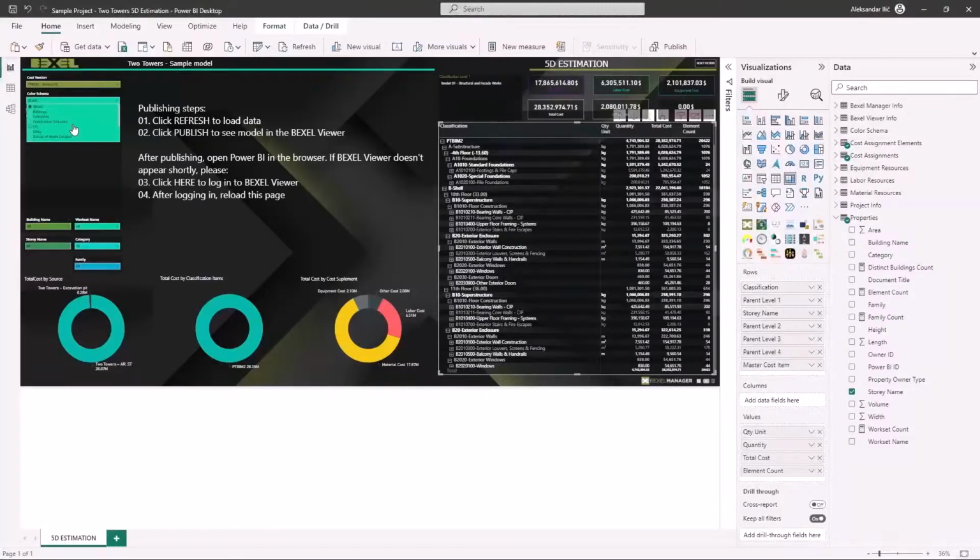They simply decided which part of the building will be assigned to which tendering package and then sent to the tendering procedure. And besides the tendering package, we also have subcontractors. That means that, again, our tendering team just specified roughly the groups of works that will be dedicated to certain subcontractors within these tendering packages.